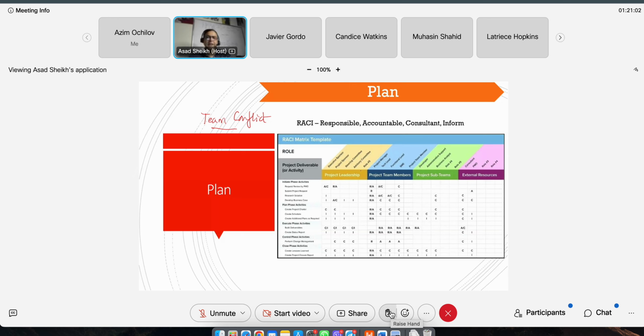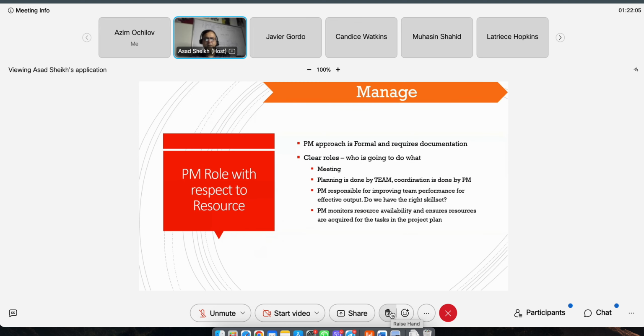There should be an easier way, so they can use this RACI matrix to sort of explain to the team members, hey, this is based on your, now this stuff here is the activity list. This is going to come from them, right? Or from the vendor, this activity list. Once you have the activity list, this RACI matrix should be done between the PM and the vendor PM. So you can partner with the vendor PM, especially if you're getting a third-party solution from outside. You can have the vendor PM join forces with you, and you can put this one together, and you can say, okay, based on the project plan of the vendor, this is what we guys are going to be doing, and it kind of helps and visually makes it easy for them to see. And you can put this RACI in the same spreadsheet where you have their names and phone numbers and all the other good stuff.